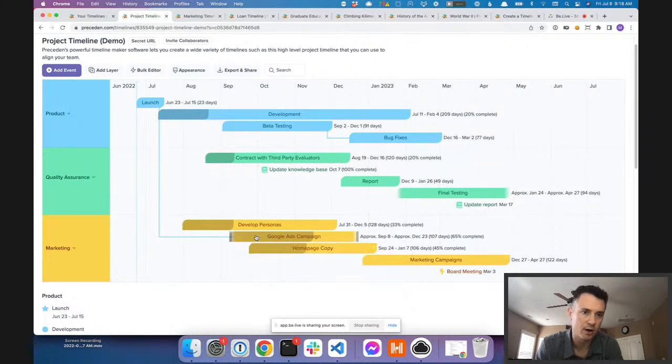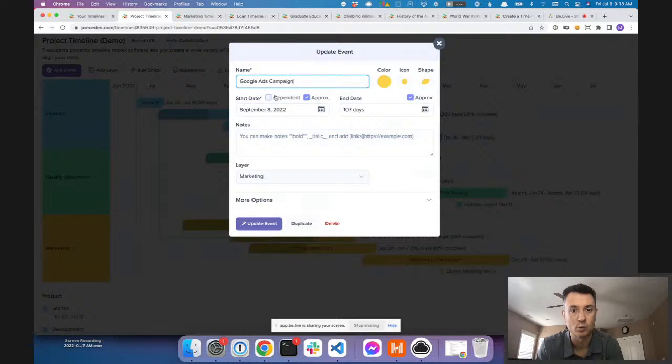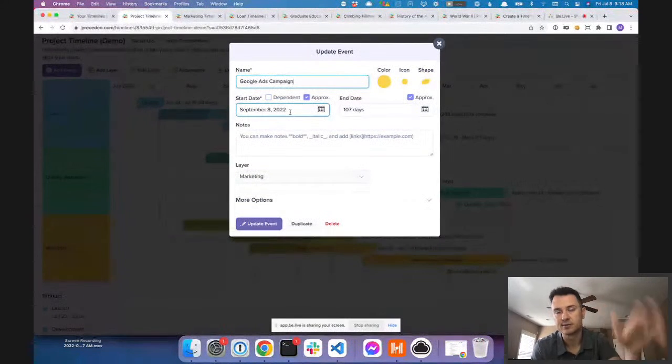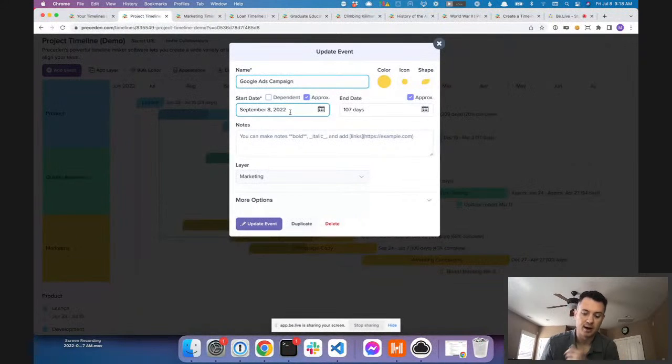And we won't dive into it all, but there's also other functionality. Like we could say we only want this event to start when another event ends. And that can save you some work typing in a date. And it will also make it easy for more fluid timelines where event B always has to start when event A finishes. We can set up the timeline like that. And then if we change event A's dates on the timeline, all the events that depend on that will get updated accordingly. I'll show you also, because we have an end date, it's going to display that bar on the timeline.